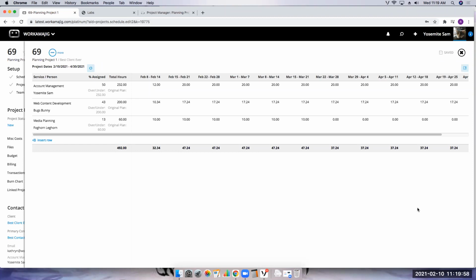I'll use that for, I'm going to say retainers in quotes, even though you can't see my quotes. It's good if you needed to build a retainer type billing based off of hours instead of dollars. So if you say, I know that I'm going to provide you those 50 hours, and this is what we bill for those 50 hours, you can allocate those 50 hours out. You want to show that you've already committed those 50 hours to this client. You may not know exactly how or when, but you have already committed those 50 hours to the client for that time period, for that retainer.